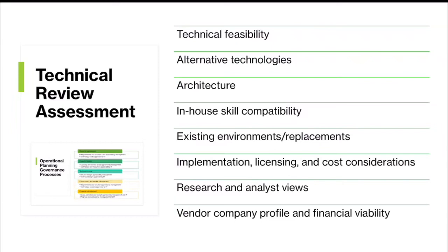So, in a technical review assessment, the following are checked or assessed: technical feasibility, if there are alternative technologies available, architecture, in-house skill compatibility, existing environments and replacement, implementation, licensing and cost consideration, research and analysis views, and vendor company profile and financial viability.